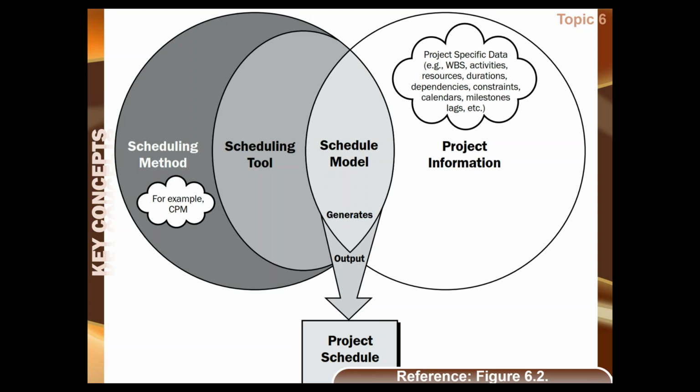and we would present it to the bosses for approving it, because the team is comfortable with executing this shape of the project, this final instance of the project, and we don't think that any further changes currently can appear into it. So we will get it baseline. When it is approved, it is baseline, and after that we can't make any changes to it by ourselves. If any change is to be brought now, that would only be possible through a proper change request. So this shape, which is finally approved, is called the schedule baseline.